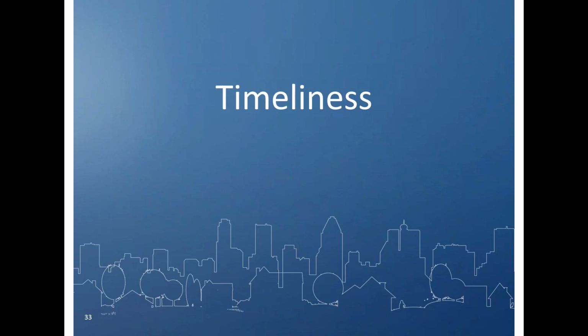Okay, so let me give you the ideal, best case answer, and then we can talk practical. Time depends on what kind of timekeeping software you use. There are some grantees, and this is the best case scenario, who literally track individual time, particularly around activity delivery, down to the level of the beneficiary or the case that the particular staff was working on. So they'll have hours for project 1, hours for project 2, hours for project 3, hours for project 4, so that you can literally attribute the hours project by project.